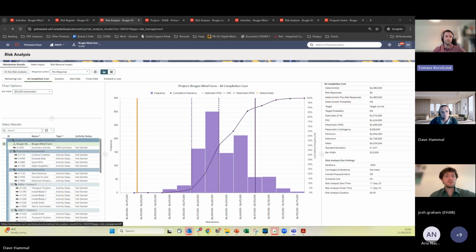The client would want to account for fewer weather days, and on the other side, a contractor would want to get more weather days into the schedule. So having one source of data that from the start all parties agree to use, whatever it shows us, saves a lot of time for everyone.